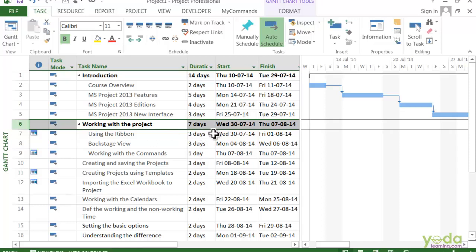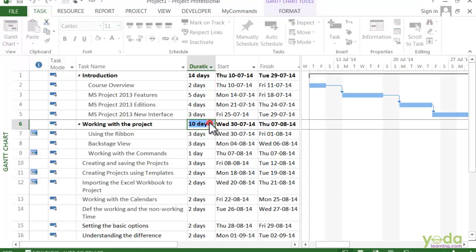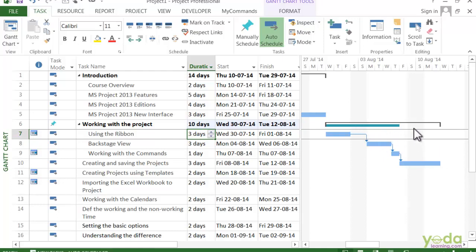But you can change the duration of this manually scheduled summary task. So let's say your manager gave you 10 days to work upon - type in 10d here, or you can use the spin button. You'll see a couple of things. The black color bracket shows the amount of time that you have typed in, and the duration field is set to 10 days.